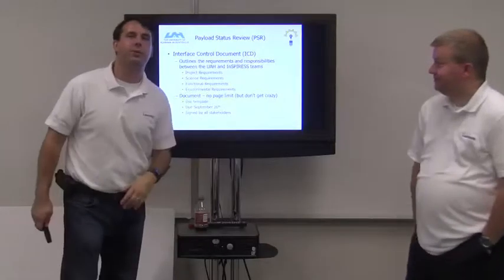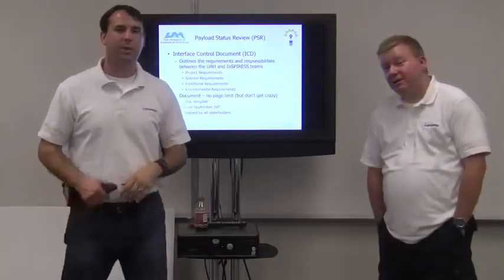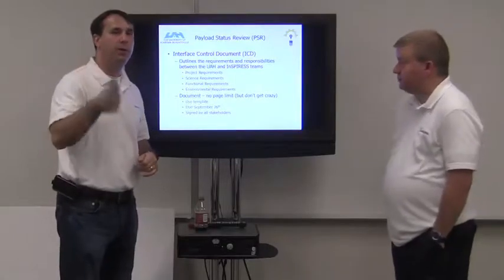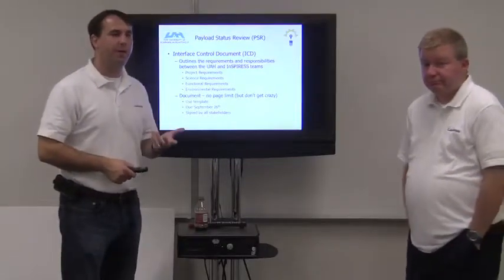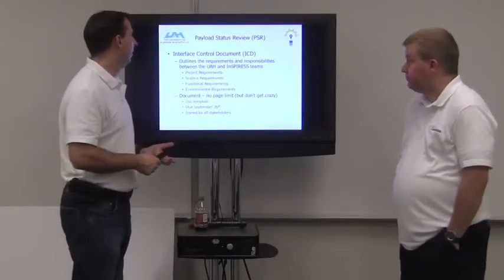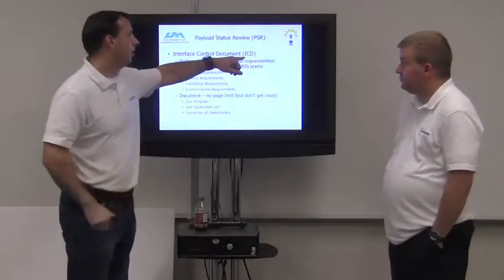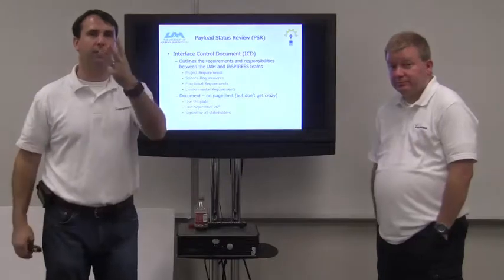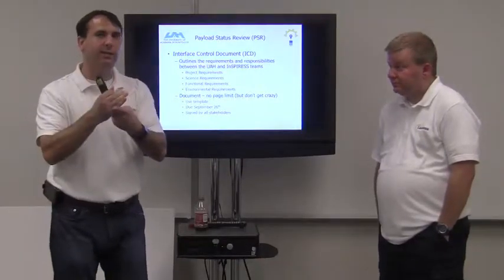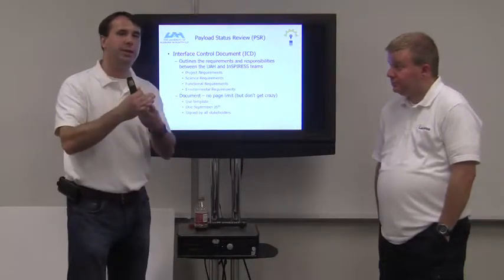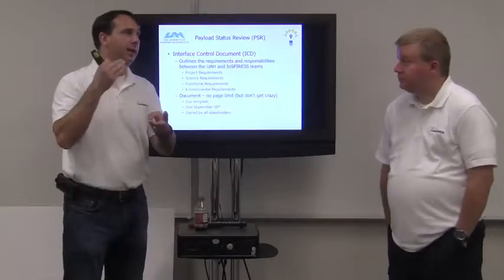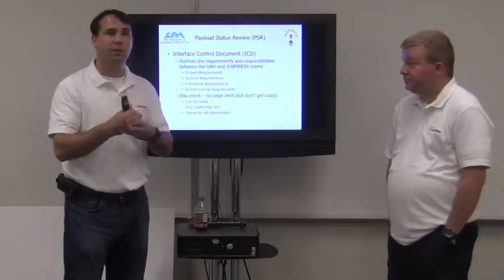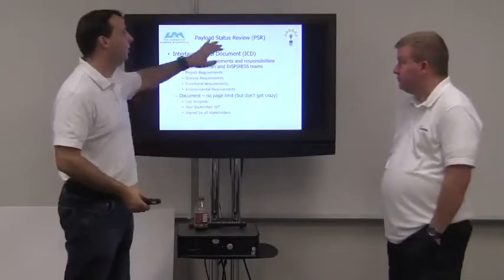The payload status review, or we call it PSR. PSR, it happens during week 8. Right before the PSR, there's a couple of things that you submit to us. The PSR is associated with three different things: the ICD, the interface control document, the community engagement activity plan, and the actual payload status review presentation itself. So there's three things associated with the PSR.